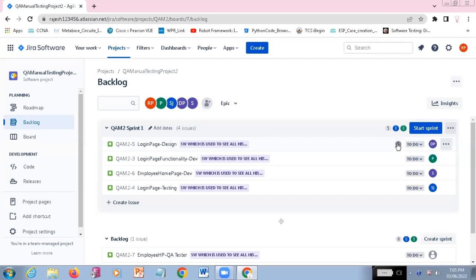Five user story points is not enough for him to complete this story, then he is going to say how many, either six or seven story points are required. If that is accepted by the project manager, then he is going to change the story points to six. Then for the other story point, the project manager is going to define that. So which is being allotted for the other person, they are going to say that around four story points is enough for completing these user stories.